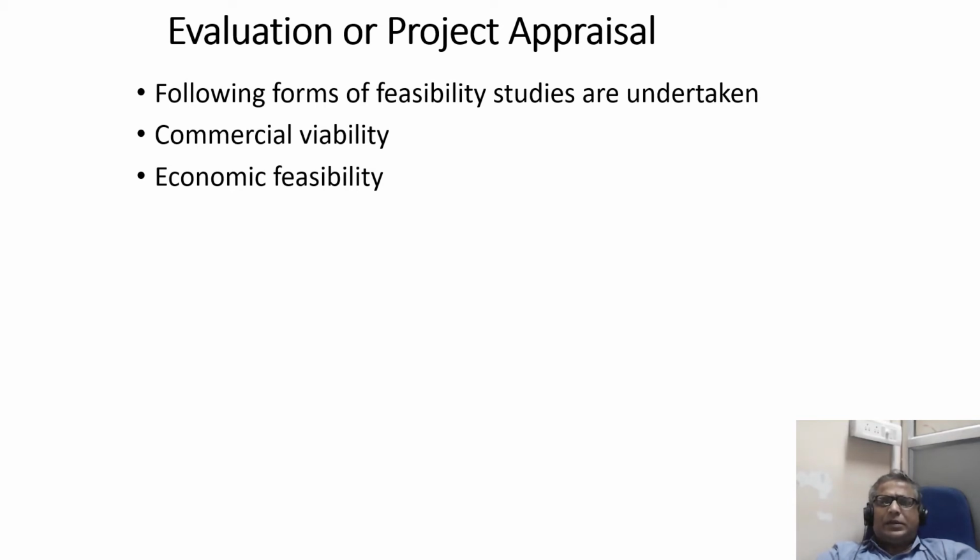The economic feasibility study is a detailed cost analysis of multiple factors. First is to determine the target market, then analyze the competition, make the revenue projections, and determine fixed and variable costs, including the economic viability analysis, by giving the cost and benefit of your project and the planned activities of the enterprise. The economic feasibility study basically needs to include all the non-economic factors as well that could affect the project's profitability or success in future.